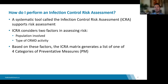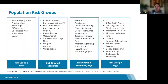The first factor to consider is the population involved, or the risk group. For long-term care settings, because residents may be mobile and found throughout the facility, anywhere in the home where there's construction activity — including laundry rooms and dining rooms — would technically warrant a level three group categorization. If it's a staff-only area where residents are not permitted to enter, it may be a lower risk category, but you need to consider the potential for people accessing those spaces.